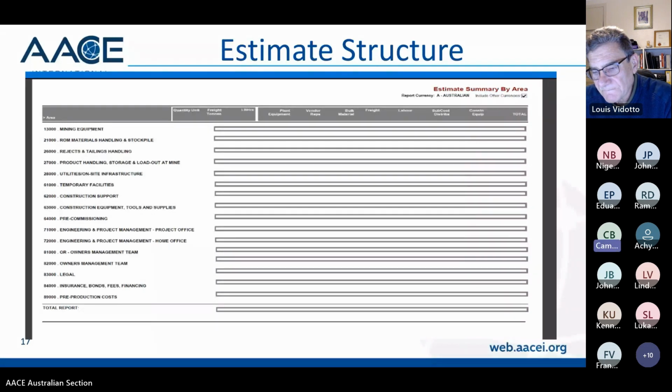We've got another question from Frank. What percentage of project definition is recommended before requesting approval for funding from the client? Probably requesting funding from a client is really towards the end of a feasibility study. Now that varies from company to company. Normally, in my experience, it's usually about when basic engineering's done, which is about 30 to 35%, maybe 40% engineered. Some companies, like some of the big mining companies, will want engineering to be at sort of 50 or 60% before you finish the feasibility study.